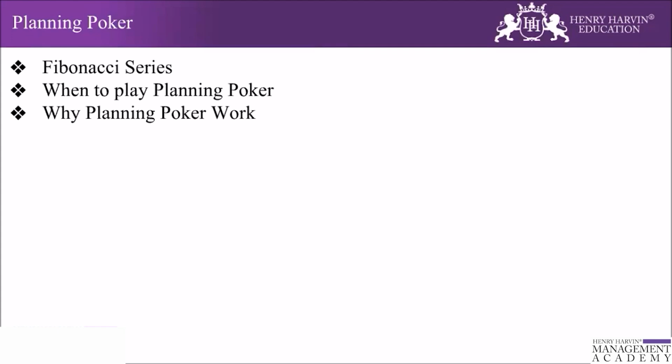The next question is why planning poker works. The first reason is that it brings together multiple expert opinions to do the estimation. Because these experts form a cross-functional team from all disciplines on the software project, they are better suited to the estimation task than anyone else. After completing a thorough review of the literature on software estimation, Jorgensen concluded that the people most competent in solving the task should estimate it.